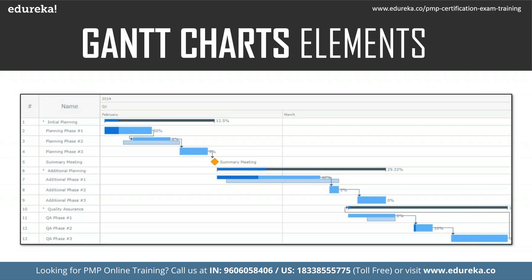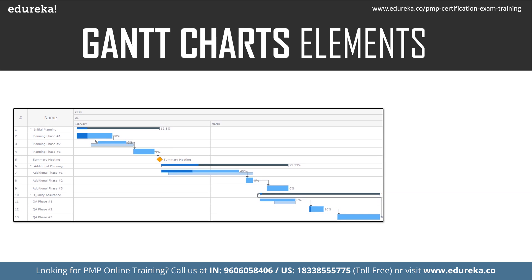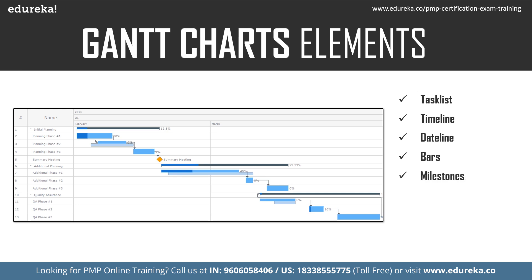How much is complete and whether the project is ahead of or behind schedule is clearly visible. This representation includes a task list, timelines, date lines, and actual dates — for example, February, quarter 1, 2014. This chart can also provide daily details, showing which activity is happening on which day. It can go to a day-level representation in the Gantt chart. You will also have bars representing each activity, and milestones — for example, a summary meeting at the end of initial planning can be marked as a milestone deliverable, and that representation is also done using the Gantt chart.